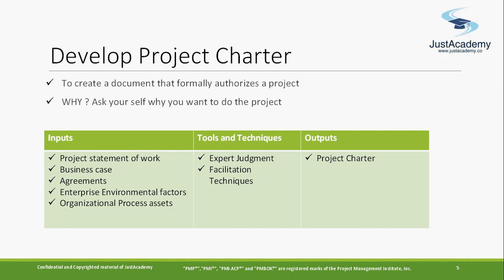When I say not under the project control, even though something is within an organization, if any factor is affecting the project and it is not in the project control, that also becomes an enterprise environmental factor. It is not something only outside the organization. It can be both outside the organization and inside the organization, but outside the project. For example, if you're doing a construction project, the municipality regulations and all those things are there. You need to take them into consideration when you're building such a project. Otherwise, your project can be delayed, or some problem can happen. So that comes in the enterprise environmental factors.